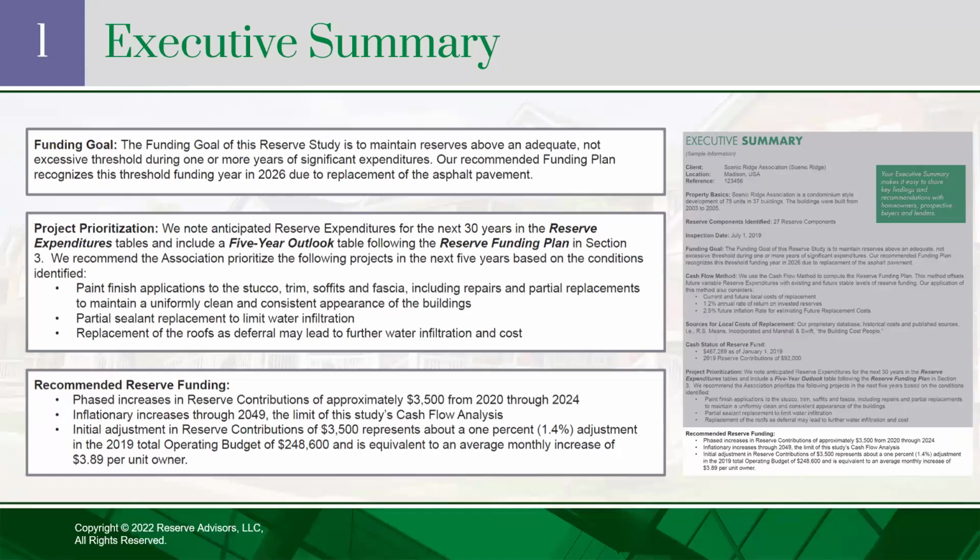And just to make clear what Michelle was saying in terms of funding the reserve study, what she's saying is that in Maryland, you are required to fund to the level recommended by your reserve study. So if you're contributing $10,000 and your reserve study says that you need to contribute $30,000 a year, you have to then, your next budget cycle has to have that $20,000 increase. And that's only in Maryland right now.